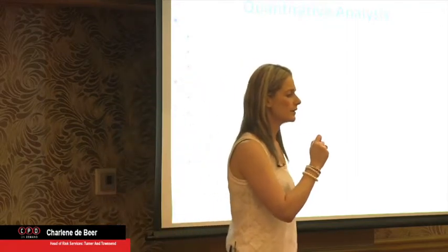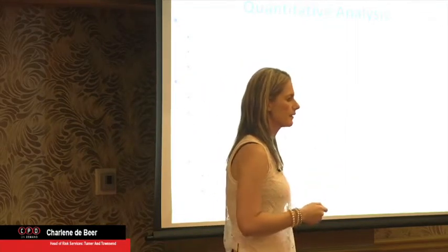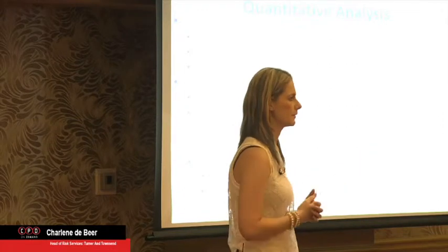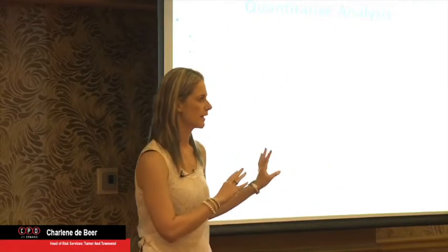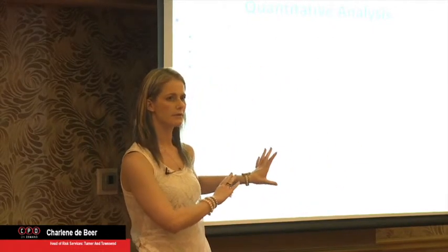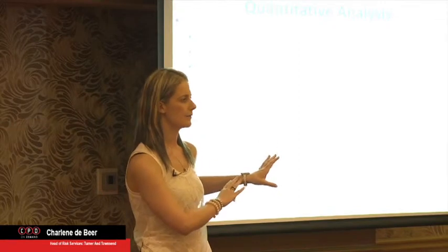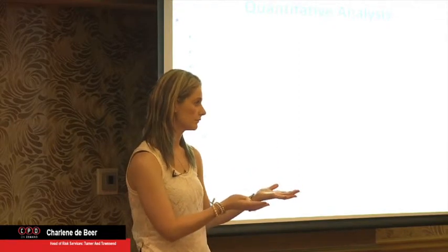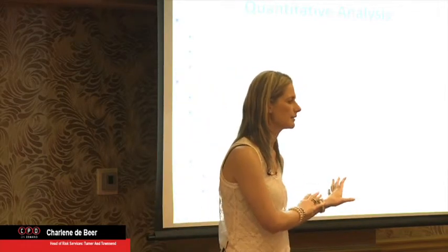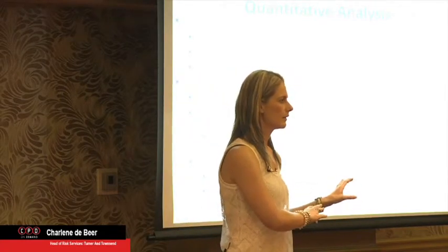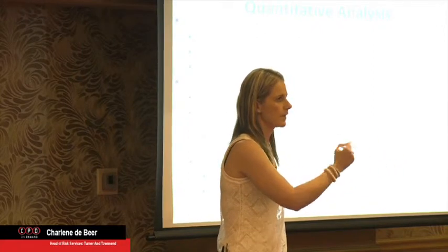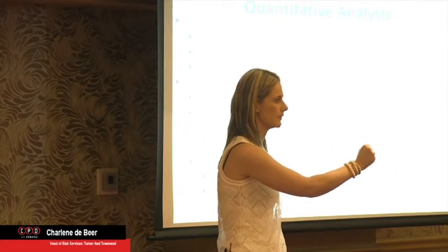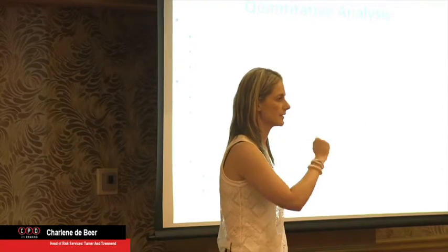And I'll say to you, so how much do we spend a month on, let's say, civils, for example? And let's say it's 4 million. So weekly, we spend R1 million, okay? So if we would delay civils, for every week we delay them, it could cost us R1 million, right or wrong? Depends on who's to blame now, but let's just say civils will stand for a week. We physically spend R1 million a week for them to work, right? Now, if there's downtime, and they are still entitled to a claim, for example, it will cost us R1 million for every week that civils is delayed.